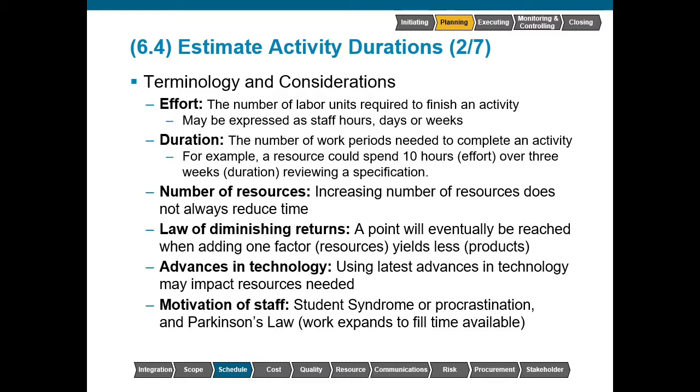The number of resources is also a consideration. Increasing the number of resources does not always reduce time. Especially in the world of software development, adding additional developers can actually increase complexity and make work slow down. I also like to use the example of trying to prepare dinner. The first couple people to go into the kitchen are extremely helpful, but by the time you get to the seventh or eighth person in there, at that point they're not really doing a whole lot.